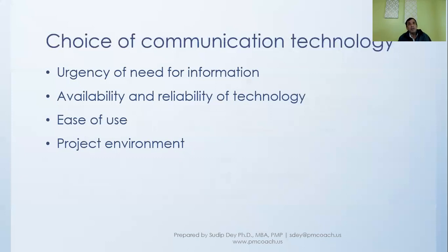Then project environment. Different projects will require different kinds of communication technology. For example, if everyone is co-located, then probably there will be a lot more face-to-face communication, and some use of a shared portal, or probably email.